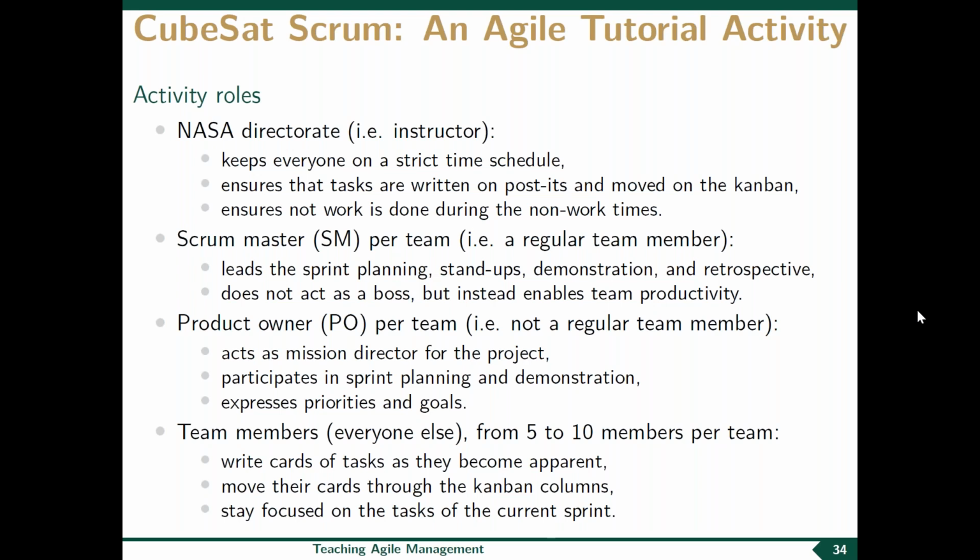Each team has a student acting as the scrum master who leads those meetings, who leads the sprint planning, which in this case takes only 5 minutes, stand-ups, which only take 2 minutes, demos, also 5 minutes, and another retrospective, which takes 5 minutes. So they're not acting as the team's boss, but they're there just to enable the team's productivity. There's also an external member of the team, the product owner, who really acts as the mission director.